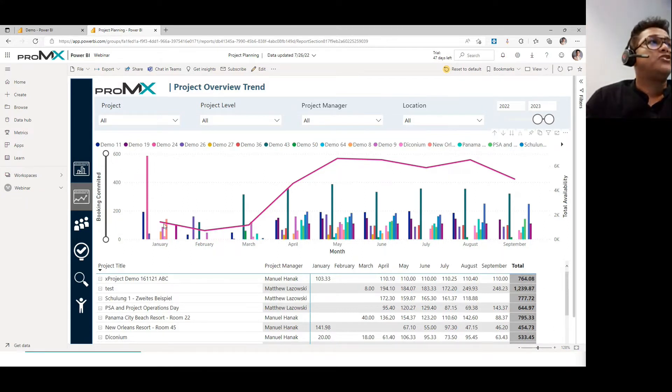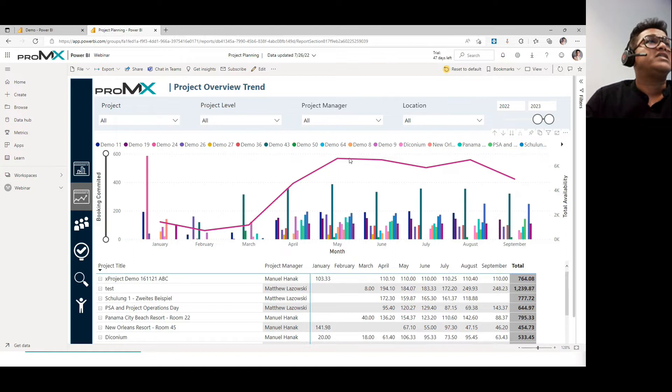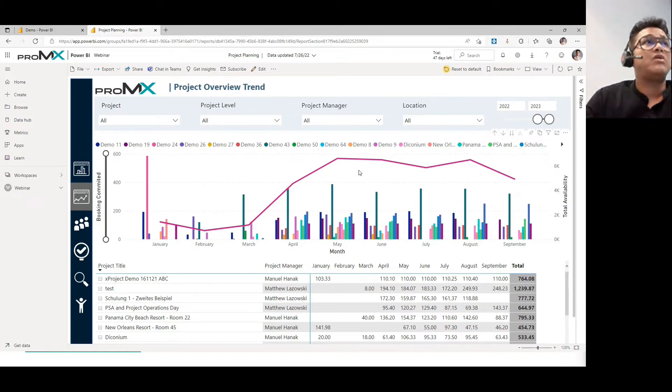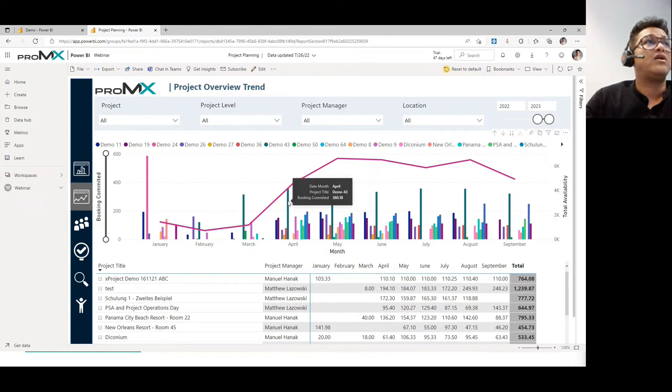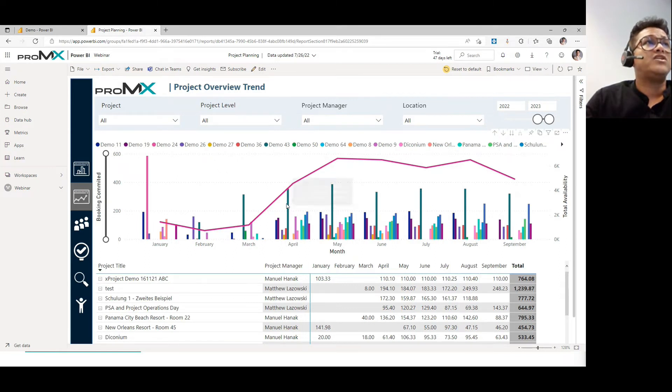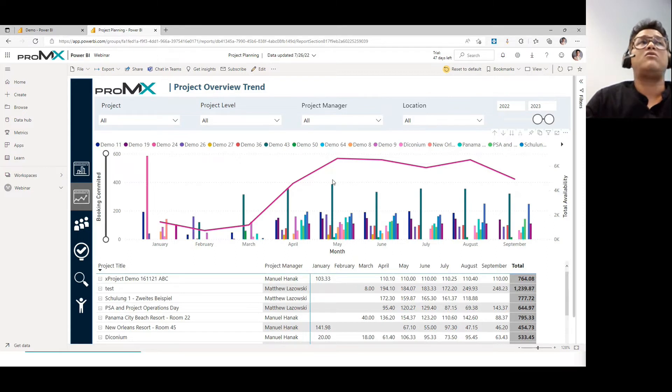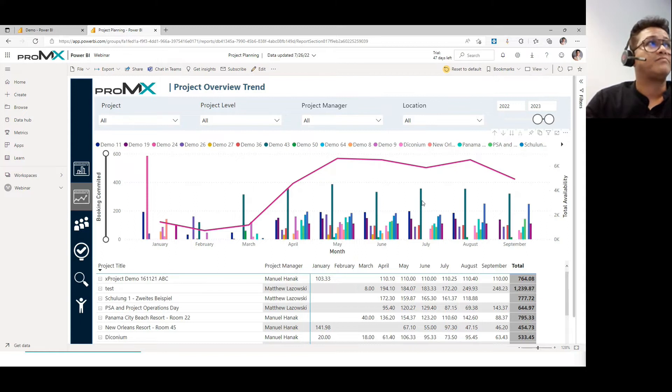The magenta or the pink color line that you see over here running is the availability of the resources that is available, but at the moment we have not fully utilized the capacity. Only in the month of April we have been able to utilize the complete availability of the resources. But yes, we do have some gap here where people are free available but not being allocated onto the project at this point of time.